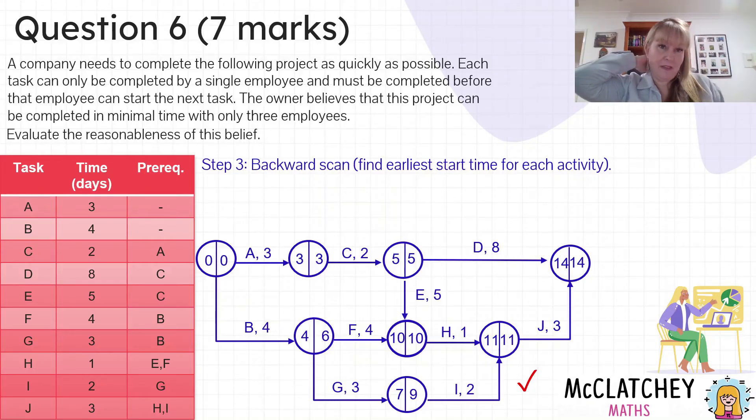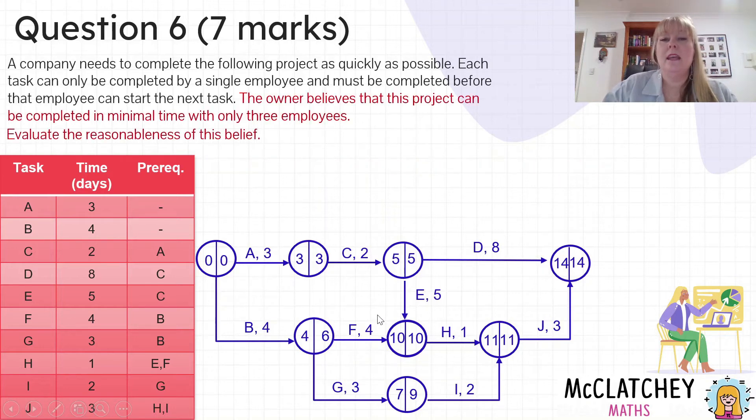Now that I've done the forward scanning and the backwards scanning, I still need to think about the question I've been asked. Can this be done with just three employees? We can see that there's three main pathways through the network. The first pathway is A, C, and D. The next pathway is B, F, H, J, and the third pathway is G and I. So we've got basically three pathways where there is something going on at the same time or in tandem with the other activities. So we need at least three employees.